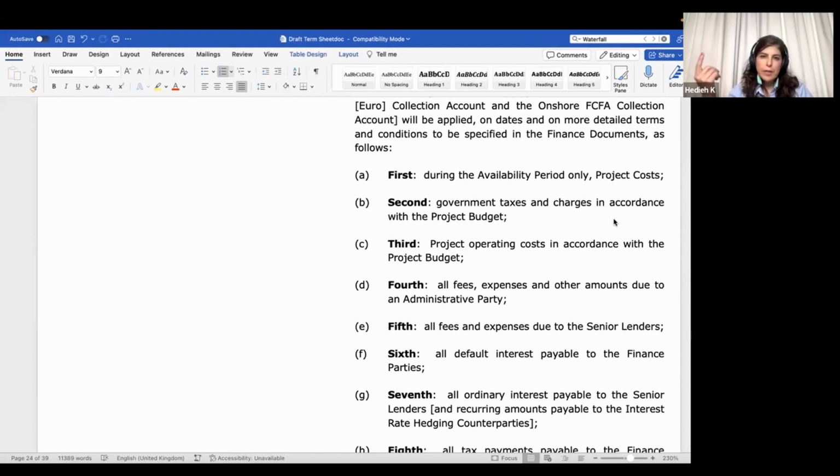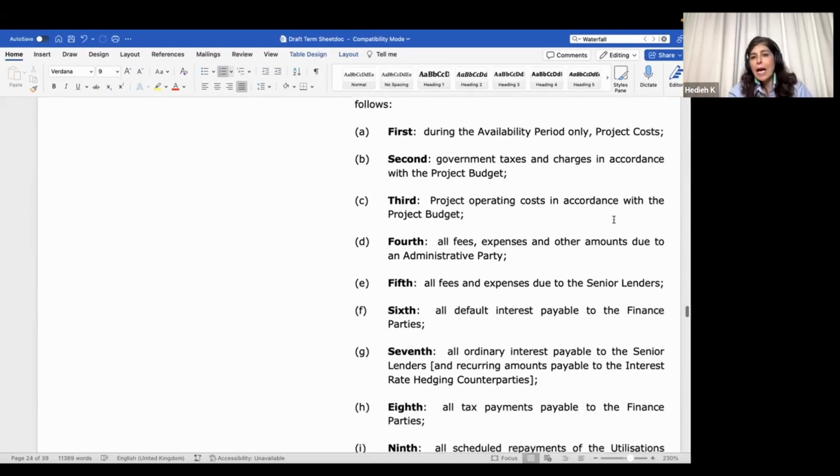So everybody is comfortable with the operating costs ranking higher in the cash flow waterfall, and it makes sense. After that, right away, we have the fees. Up to here, in terms of the financial model, we have reached this line called cash flow available for debt service, which is what the lenders use as their metric to size the debt and to calculate the different debt metrics that they use.